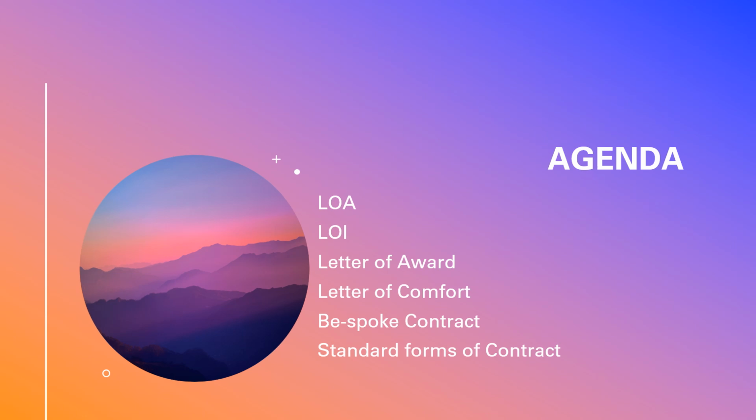You're waiting for permits, municipality documents, and all those permitting authority documents from the municipality. But still you want this contractor to start some initial work, like working on some drawings, on some long lead items, or on a program. In this case, what you do is issue a LOI.